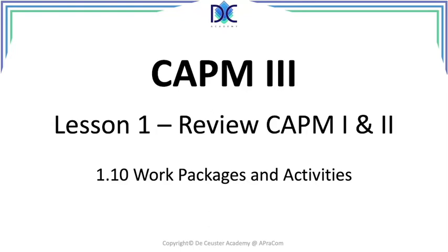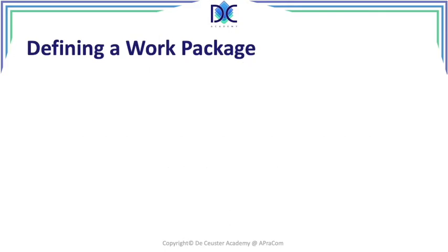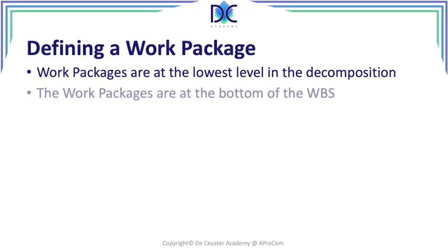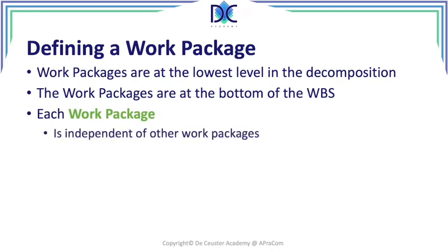So let's have a look at the definition of a work package. Work packages are at the lowest level in the decomposition of the work breakdown structure — that's what PMI defines. Each work package is basically independent of other work packages.